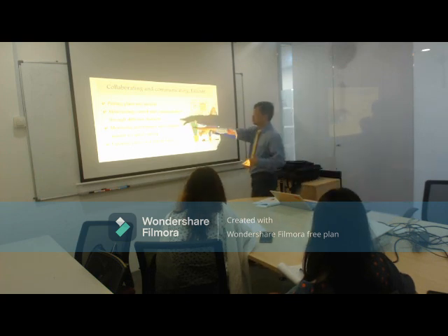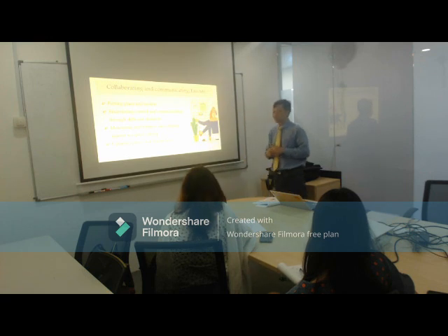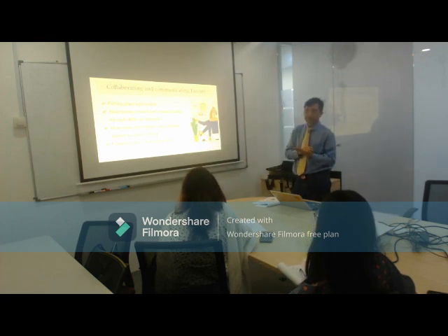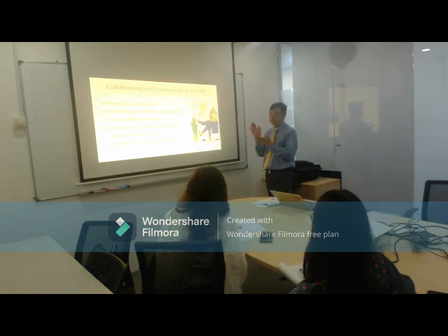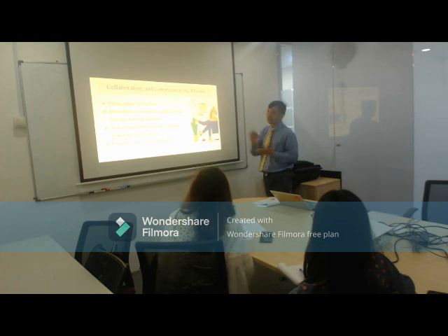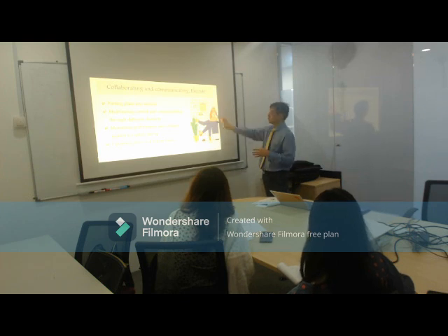Other performance that you might need to have is making sure that the code that you have is the correct paint code, and during the painting they need to be able to paint 3 layers, for example, and for each layer they need a certain amount of time to let it dry before the next layer. She wants to have good paint quality, because if you have 3 layers, the paint will last you for many years.